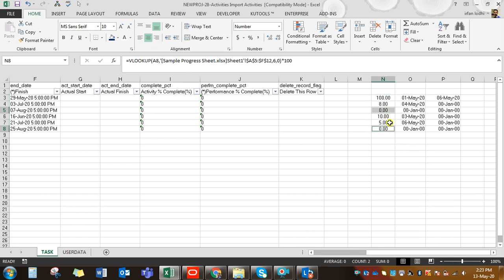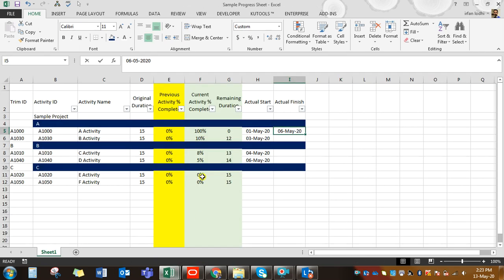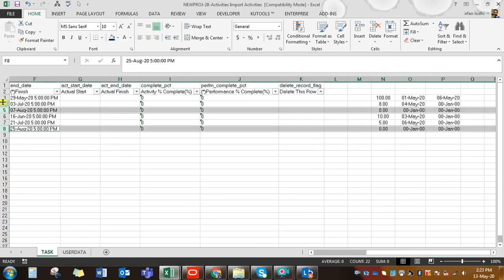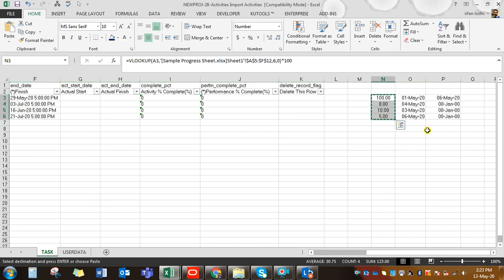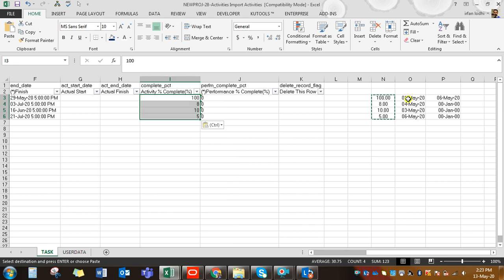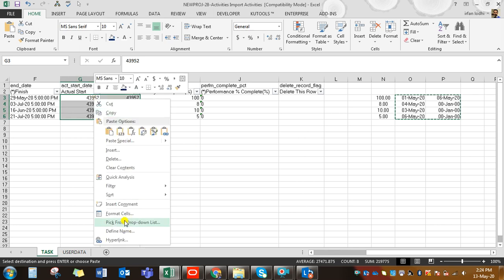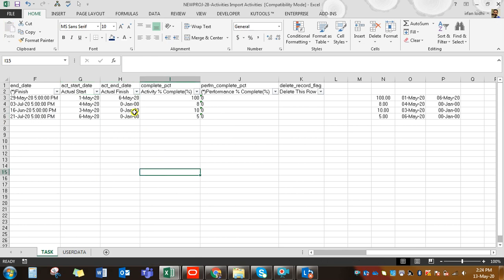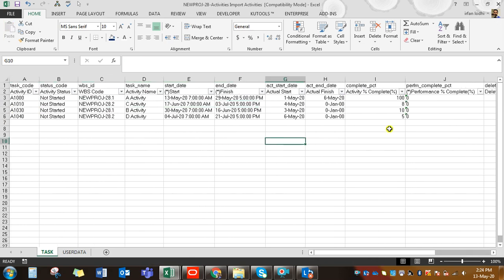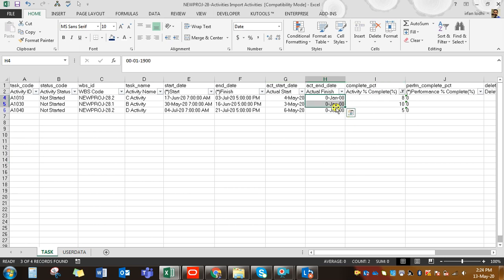Looking at the results, two activities have not started, so we do not need to import those two — simply remove them. We paste the percentages as values into the exported file, and paste the actual dates under the actual date columns as values, then format those cells as dates. For the three activities that are in progress there is no actual finish date, so we simply remove those finish date cells.